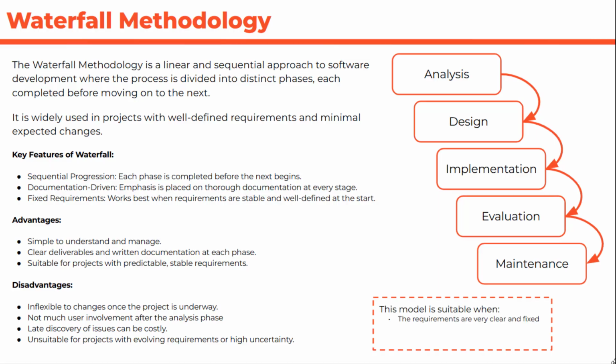So the model is suitable when the requirements are very clear and fixed, there's no ambiguous requirements, and technology is well understood. And also, the project is quite short. Not great for long-term projects.